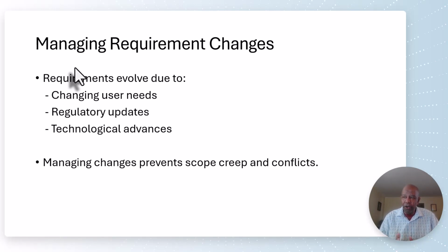That is where you're working with the user. The user says, okay, can we do this? I know we said we want this, but can you do this a little bit pizzier? And then you do that, and then the next time they say, well, okay, that's good, but can you do a little bit pizzier? Okay. And so what happens is you start getting what we call scope creep, okay, where the application and requirements are getting bigger at small increments at a time, which can get to the point where you find yourself unable to satisfy the requirements because you don't have enough time or resources, because you had scope creep.